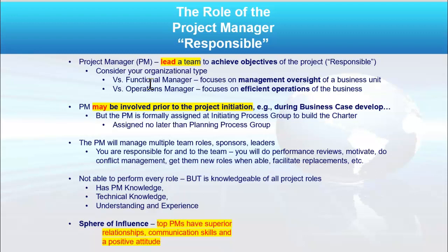To not be involved early is a mistake. It does happen. And if I'm late to a project, say I was hired after project initiating began, the first things I'm going to ask for: can I see the benefits management plan? Can I see the business case? Can I see the charter you've developed, right? That'll help catch me up to speed. Because you're jumping into this sphere of influence, right? Where you've got to develop these top relationships and superior communication skills, and of course, always bring a great attitude.